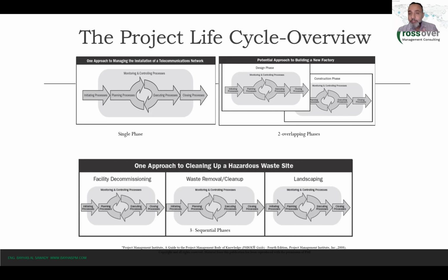There's the possibility that you're working on some designs and you have some designs approved that you can start constructing immediately, right? So to gain some time. Yeah, so this is an example of two overlapping phases. This is an example of a multi-phased project. We call this a multi-phased project, okay? That consists of two phases, and those phases are overlapping. Okay, does that make sense?